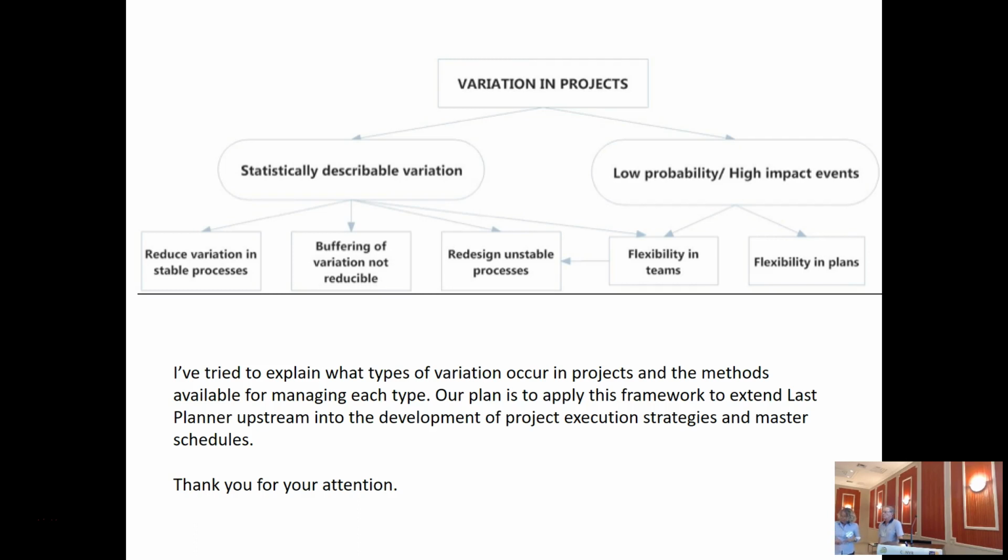Just very quickly, I guess when we don't know where equipment is going on a slab, then we increase the capacity of the slab, so we can put it anywhere. That's an example of a hedge. Is that right? Right. Yeah, because it's a cost. It's like buying insurance, right? You know it's going to cost you something because you just paid for it. Right.